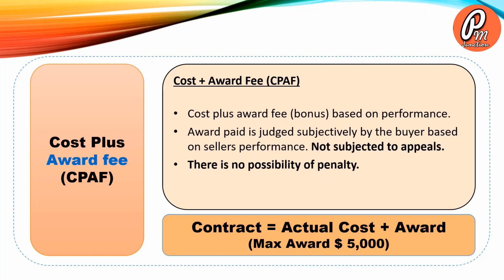The major difference between incentive fee and award fee contract is, in incentive fee contract, buyer and seller share the profit and loss, while in award fee contract, seller is not subject to any penalty, but he may get some award based on his performance.